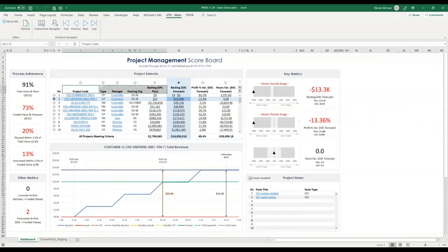The Project Selector also allows the user to do more than that, because it is a sortable, filterable list. You can see 10 projects at a time, but this is a scrollable list. And you can sort this list of projects based on key metrics that are important to you. These last 4 columns in the Project Selector give the user access to 80 different project performance related metrics related to revenue, profitability as a percentage, profitability in terms of dollars, average bill rate, hours, backlog, even the estimated workday that a project goes at risk, and the estimated workday that a project exceeds 75% of its funded value.